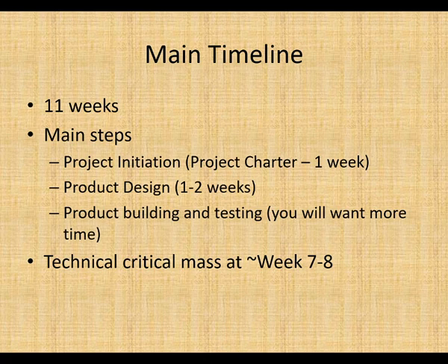In product building and testing, that's the fun part, where you actually start busting code. My experience has been, no matter how long you allocate for that out of the total steps, you always want more time, so you want to move through the other two as quickly and deliberately as possible. Now, there is an additional consideration: you're really not going to know enough to actually start doing the programming until about week 7 or 8, unless you've had some previous experience.